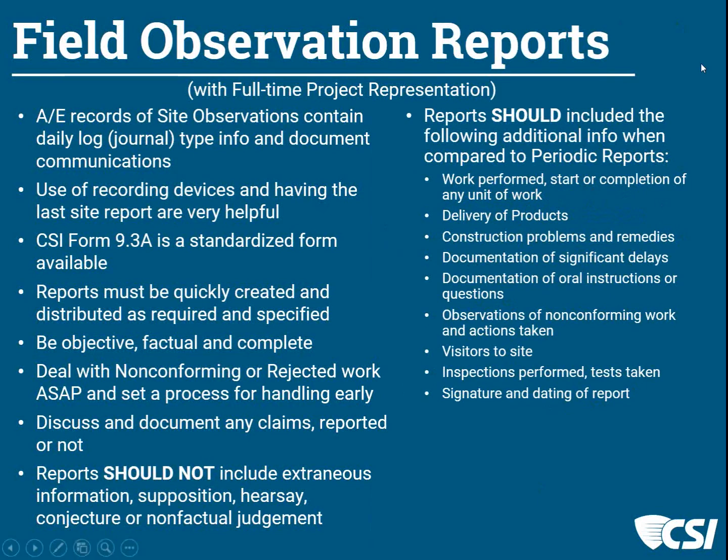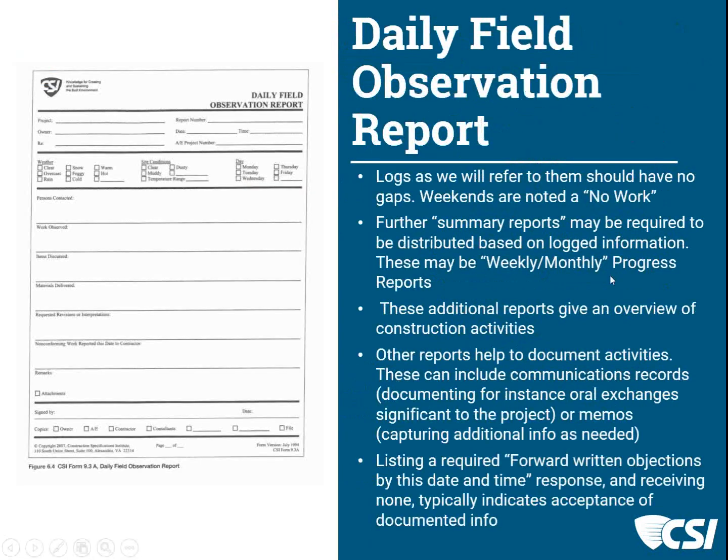So if you take a look at the next slide, this is just a CSI form that uses daily observations, and it's not meant for you to read it, but it's in the practice guide. So why would this be a different form? Well, because you're doing it daily, because you're able to make much more detailed notes about what's happening on a daily basis than if you're just there weekly or some other schedule. You're able to document activities that are going on at particular times and numbers of workers, etc.